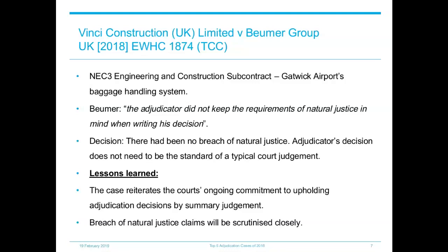Regarding the first argument, the TCC found that the adjudicator's decision was not inconsistent with previous findings because earlier adjudications had only dealt with the monetary value of certain compensation events. Beumer's claims for extensions of time in respect of those same compensation events had not previously been determined. The extension of time claims could therefore be dealt with in the latest adjudication, and the adjudicator was not bound by any previous decisions. The court also mentioned that whether the adjudicator's conclusion was right or wrong, it was no concern of the court on an enforcement application.